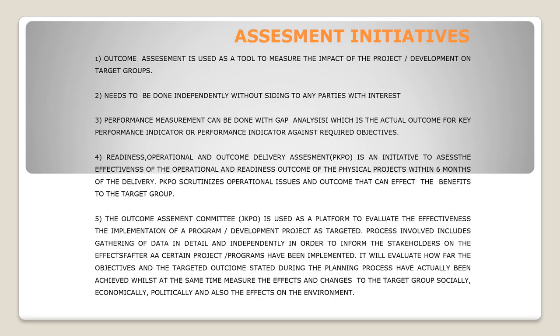Assessment initiatives. Outcome assessment is used as a tool to measure the impact of the project or development on target groups. It needs to be done independently without siding with any parties with interest. Performance measurement can be done with gap analysis, which is the actual outcome for key performance indicator or KPI or performance indicator against required objectives.